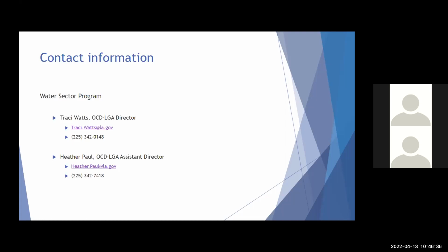If property acquisition is paid for by the grantee, do they still have to comply with the Uniform Act? The easy answer to that is yes. Again, it goes back to the intent of the use of the property. If the system acquired property prior to submitting to this program and prior to having the thought that they're going to use federal money for the project, then they did not have to follow the Uniform Act. But once they made the decision that they're going to apply for federal funds for this project and then they acquire property, they have to follow the Uniform Act, no matter the source of funds.